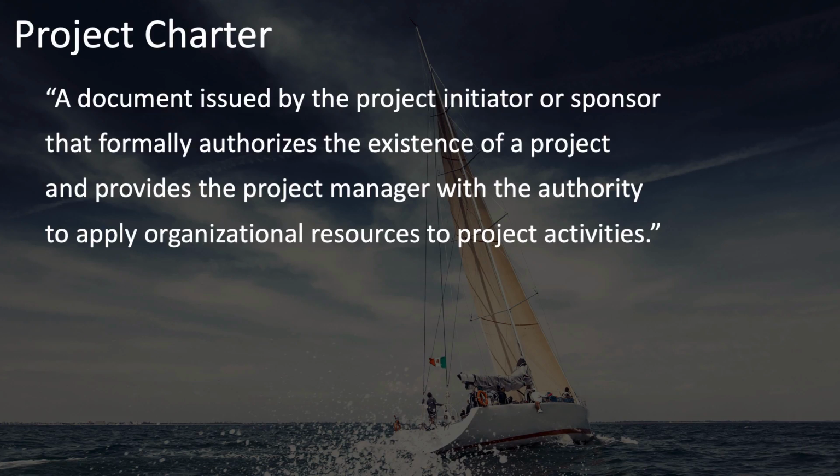This document is issued by the project initiator or sponsor, not the project manager. Although it is quite common for the project manager to do the work of creating the project charter, it is the project initiator or sponsor who issues it.